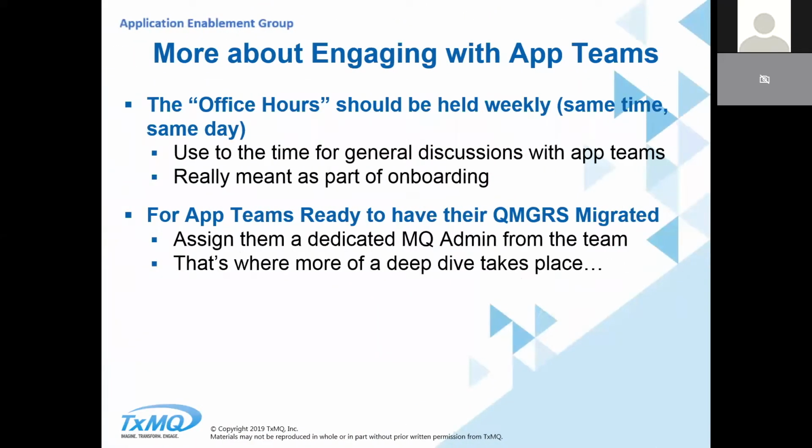Other activity for the application enablement group: the office hours should be held weekly. Again, same time, same day. Use the time for general discussions with the application teams. It's really meant as more of onboarding. This makes more sense if you're part of a large shop where you work with dozens of application teams.